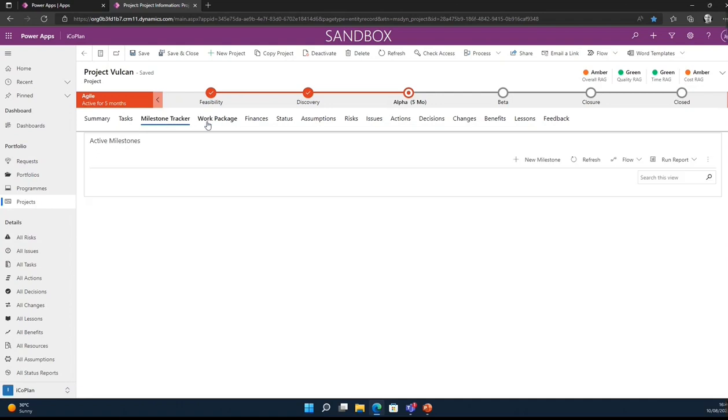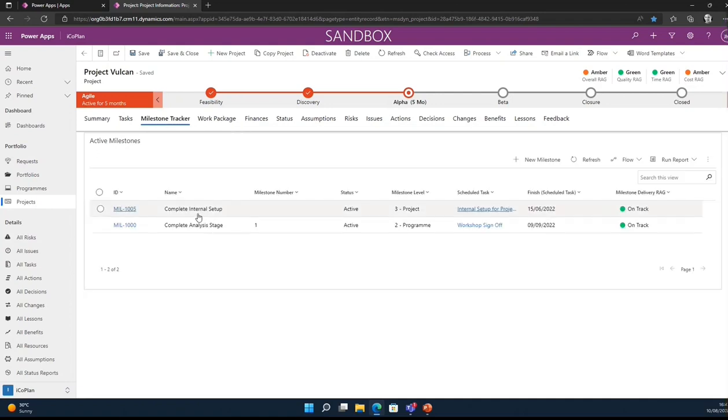All right. We've got things like milestone trackers. We can take a task and make it a 0-day task, and it becomes a milestone automatically. That's a bit of configuration we've added, just because you could do things with milestones in the future. So you had like a discovery milestone, an alpha milestone, or beta milestone. Then you could just start bringing those through, copying the task across to the milestone tracker, and then adding further attributes to it as well.